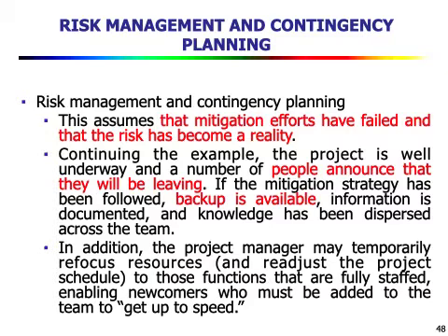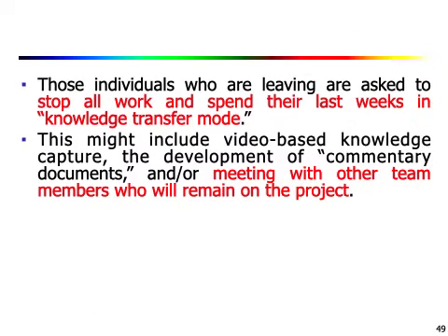Also, those individuals who are leaving are asked to stop all work and spend their last weeks only on knowledge transfer. This might include video-based knowledge capture, the development of commentary documents, or meeting with other team members who will remain on the project, etc. So this is how they are going to perform risk management and contingency planning.